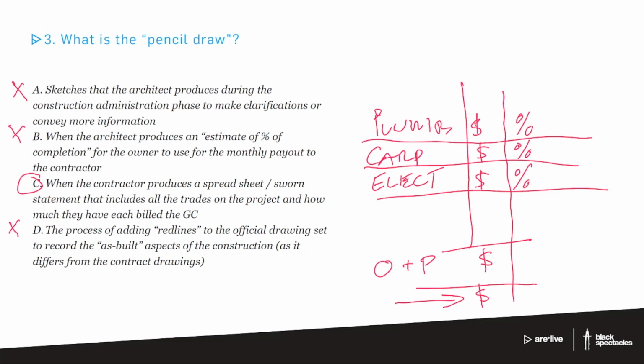That's a way of getting those plumbers to come back and finish stuff off at the very end. Once they are done, once we get to final completion, everybody gets paid out. Actually, often substantial completion, depending on the trade.